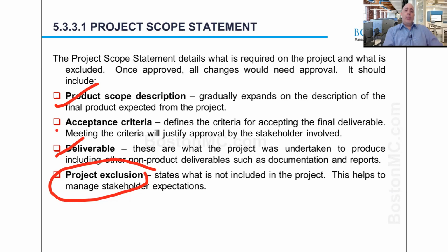Also, in addition, you may want to put the acceptance criteria, and this is like the handover criteria. So if you were working on a building, then at the end of the construction, you can expect that the receiver or the sponsor's engineer is going to come check that building, test all the faucets, test the electricity, the doors, elevator, whatever it is. They're going to check it to make sure that it meets their criteria. If it's an IT system, maybe you have to run this for a week. Whatever the criteria is that they give you on the other side before they can take it.